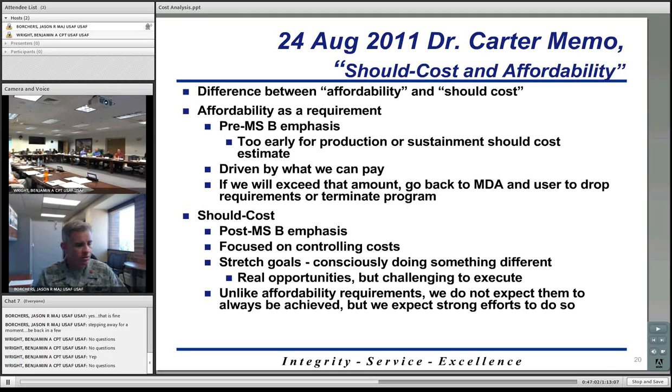So when they're putting together the new presidential helo cost estimate, they will have some cost in there that will reflect cancellation. It won't necessarily be what the previous cost was, but it'll be how much will I have to pay the contractor based on how much they've invested into this termination cost. That's the term I'm looking for. How much will I have to pay the contractor to cancel this program? And then along with that, you'll assign a probability to that cost as best you can between you and the program manager.